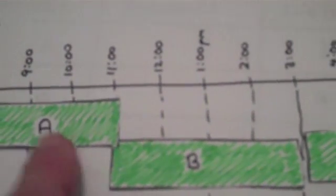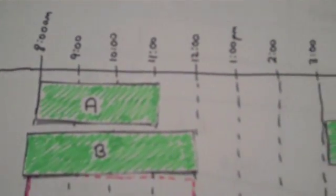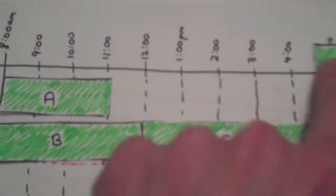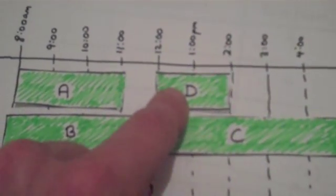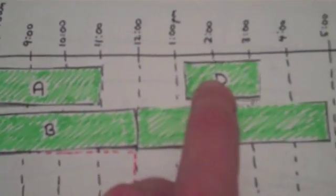What if I had more than one person doing it? Then I could split the tasks. For example, one person does task A and a different person does task B. Once both are finished, I can get on with task C. The first person can do task D as soon as A is done — no need to wait for B. D can happen anywhere in that window, as long as it's finished by the end.